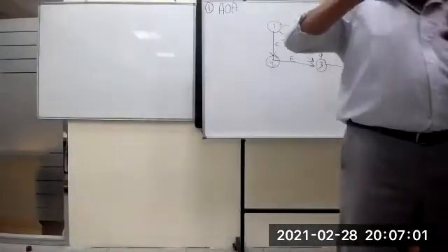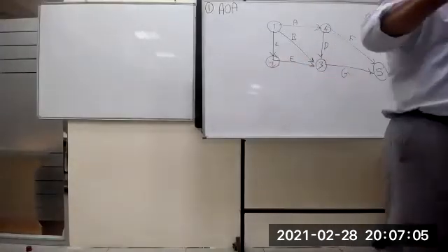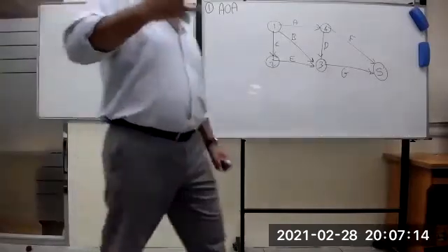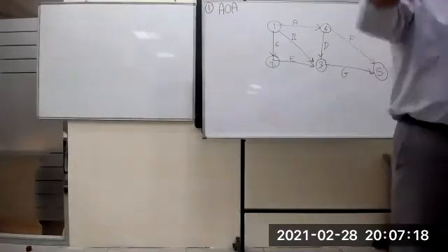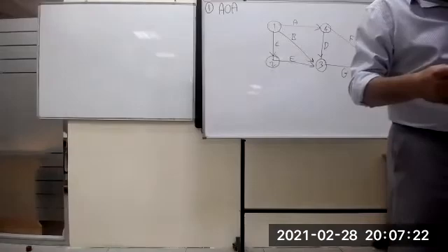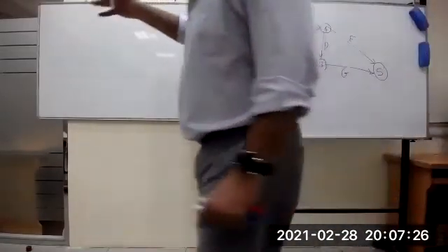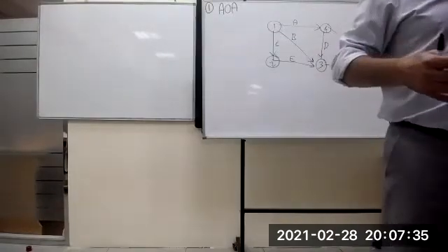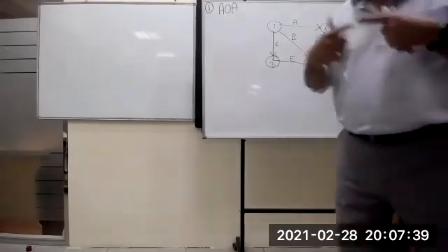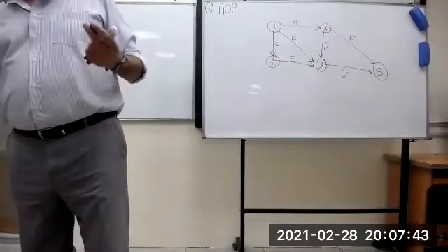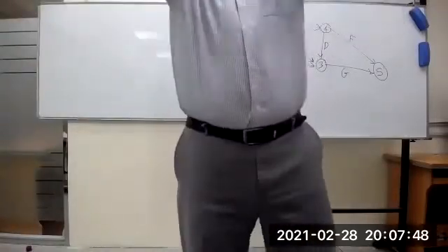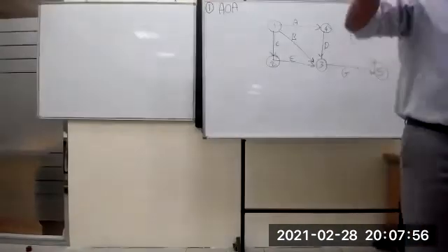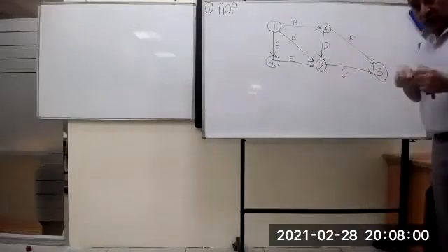This is for your information, but it's not in your exam. Don't worry, this is computer based and inshallah it will come to you. In our baseline, we shouldn't have any open-end activities. All the activities should have a relationship between each other. Only the first activity has no predecessor, and only the last activity has no successor. Even if you have 10,000 or 20,000 activities in your baseline program, all of them should be linked with logic. It's not just linked randomly. This is scope, where school tells you how to link it, with a lot of techniques, and checking, even the type of the project itself. We don't need to go into this now.